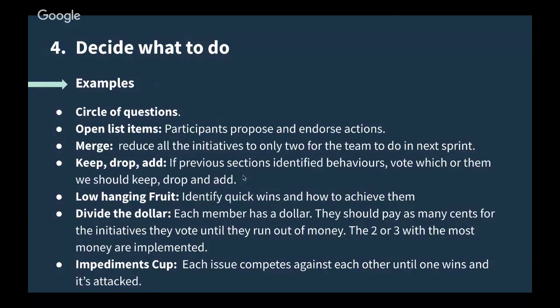If you have a lot of actions or lots of things the team believes could be done or are needed, and of course you can't do them all, you could use the divide the dollar exercise. Basically, everyone has $1 and they vote in cents for initiatives. So if you really believe in one of the actions, you vote the whole dollar to that action, or maybe you could split it among several actions, but then you add how much each action is worth, and the first 2 or 3 are the ones to implement.